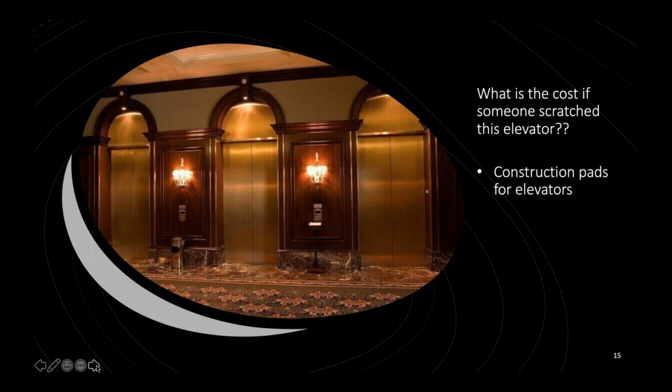Most of the time, what's referred to as the engineer or the plant manager there will have access to those pads. They probably already own them, and they're stored away somewhere, but they simply fit onto clips that are pre-made into the elevators. If they don't have that, then before you start lugging a bunch of equipment in and out of a very nice elevator, I recommend you go get some pads.